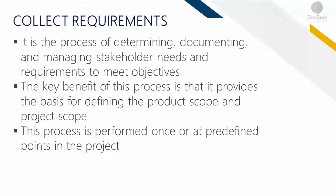As you get more experienced, keep in mind that as a project manager you're most likely not managing a single project — your company may give you three or four different projects to manage depending on the workload, and those projects could be different: one could be a software development project, another could be an internal project, and so on. In collect requirements, the inputs are the project charter, project management plan, project documents, assumption logs, business documents, and so on. The tools you can use include expert judgment, gathering additional data, data analysis, and making decisions. The output is the requirements documentation or the requirements traceability matrix.